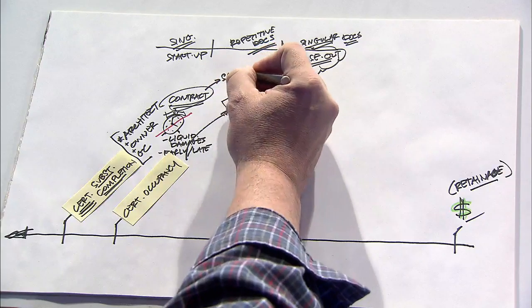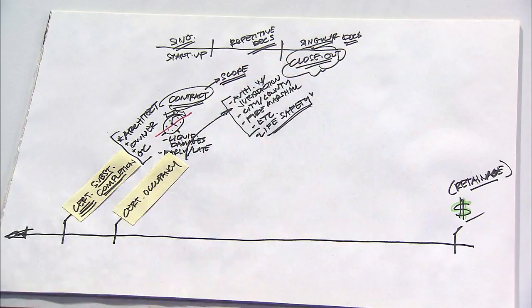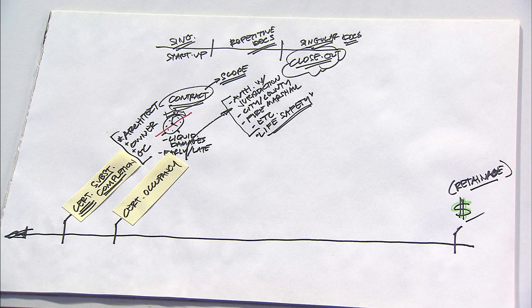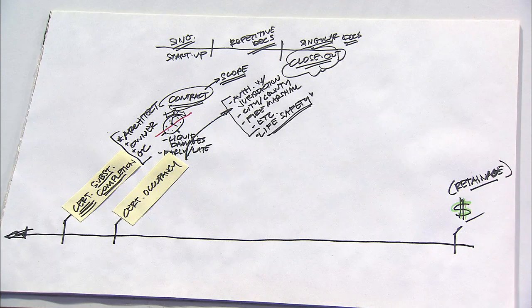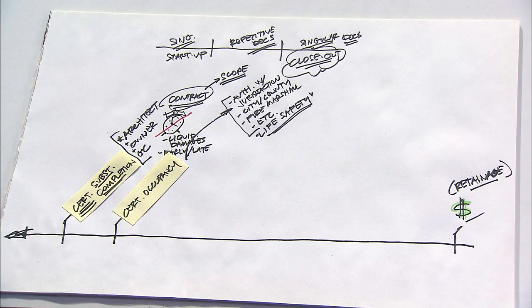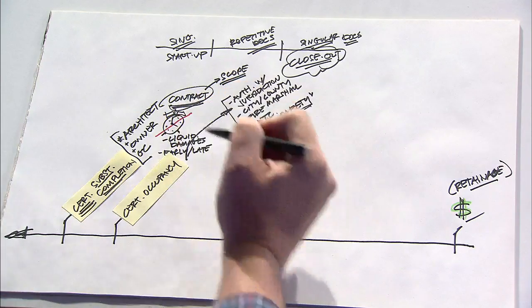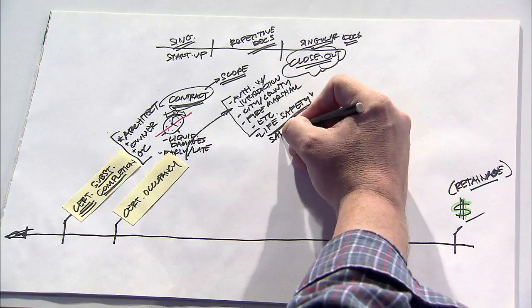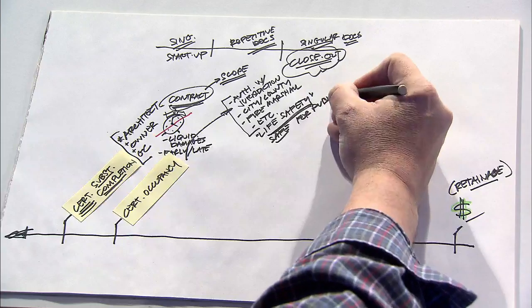Said another way, the contract has a prescribed scope of work. There was a certain type of brick required, there was a certain color of paint required, and so forth. And all of those things would have to be completed correctly as part of the contract. But the Certificate of Occupancy doesn't have anything to do with whether or not the contract scope was met, but rather whether or not the building is safe for the public to occupy.